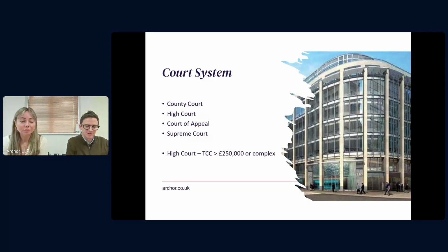You might be dealing with a judge who's not necessarily a specialist in construction, which is not a problem that you have in the TCC. My general view is that if you've got a lowish value claim that would end up being in the county court, then you're most likely better looking at adjudication.